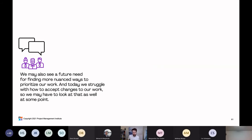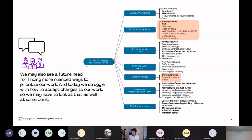The team also identifies a future need for more nuanced ways to prioritize work and struggles with how to accept changes. They pull up the goal diagram and see all the ways to prioritize work — maybe today they're only prioritizing by due date, which is a great start. But what if they also need to prioritize by risk, business value, or cost of delay? Looking at accepting changes, a lot of scrum teams will only accept changes in future iterations — but what if the change is needed right now? They can see that accepting changes during the iteration is also an option.